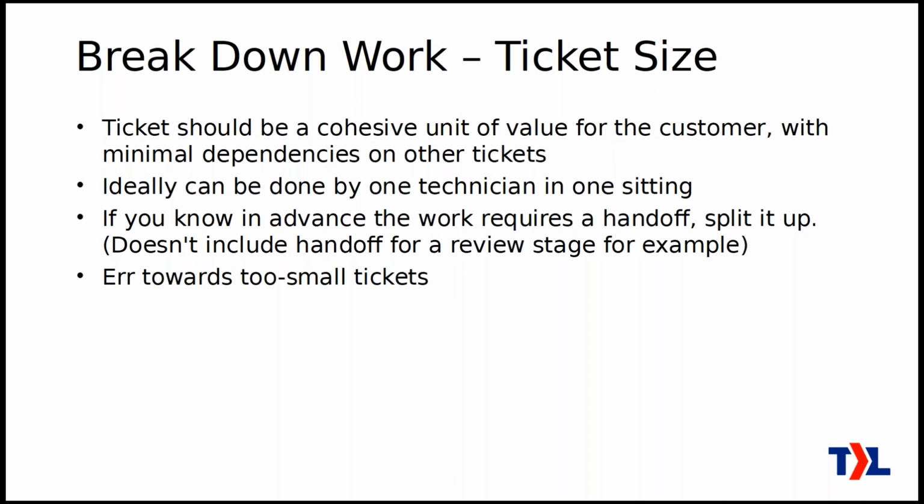If you find that you're doing too much busy work moving tickets around, then you can always make them bigger next time. What we want is at the very most 2 days of work, 16 hours or whatever. The only exception is if it's really unprecedented, risky work, research and development of something, and the customer understands that and has the budget to match. Then go ahead and make it more than 2 days of work. But that's usually a minority of the work we do in MSPs. So you're looking at most 2 days of work.